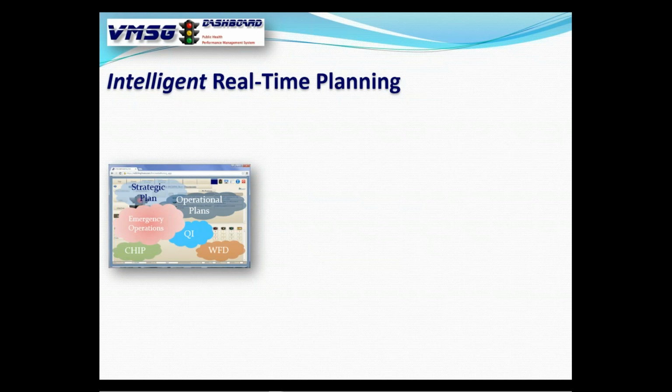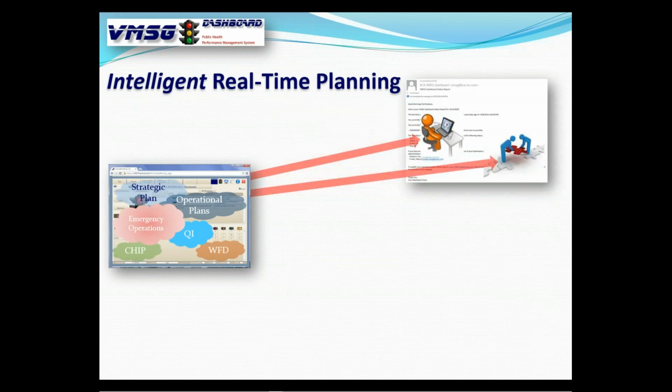What happens on that first Wednesday at 1 in the morning, the system's going to go in and look at every one of your users and ask 3 questions. Number 1, have you been in the last 30 days and updated your stuff? Number 2, do you have anything behind schedule? Number 3, do you have anything overdue? If any of those is true, out go the emails. Again, you can go to internal folks as well as selected external partners. In the emails, a link.